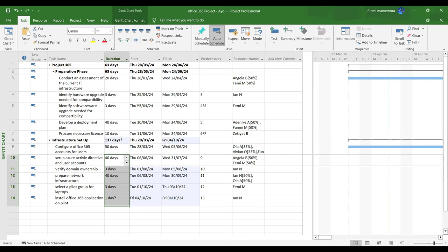Do you get? So you're saying that you need Ola to work on all of those at the same time. It's just like saying, I need to deliver PM training and I also need to deliver a manual tester training at the same time, on the same day, between 9 and 11. I've been over allocated. So what we've done now is to say, do PM training from 9 to 11, then from 11 to 1, you can now do the manual testing. So I'm not over-allocated anymore.